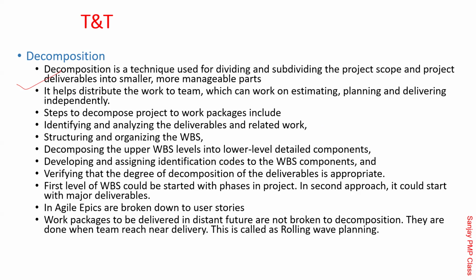Steps to decompose to work package include: number one, identify and analyze the deliverable and related work. Structure and organize the WBS. Decomposition of upper WBS levels into lower-level detailed components. So what are the interim levels? What are the final levels? Develop and assign the identification code. As I told you, code of account identifier. Give the codes to the WBS components and verify that the degree of decomposition of the deliverable is appropriate.